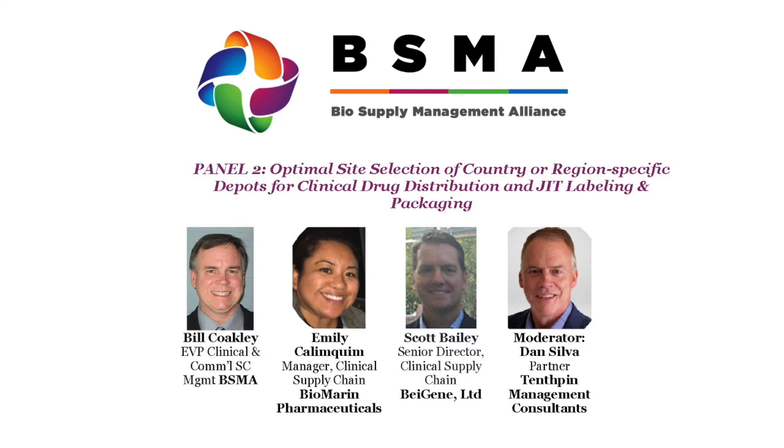And with that comes where you have to list who is going to be touching your product. What's the name of your depot? Do they have the right licenses to carry GMO products? How do you know this? And so one of the issues that we had was, as I said before with BioMarin, we only had one distributor. Come to find out, their third-party partner in that country straight up told us, we can't handle GMO products. You're going to have to find somebody else to receive this product and ship it to the clinical sites.